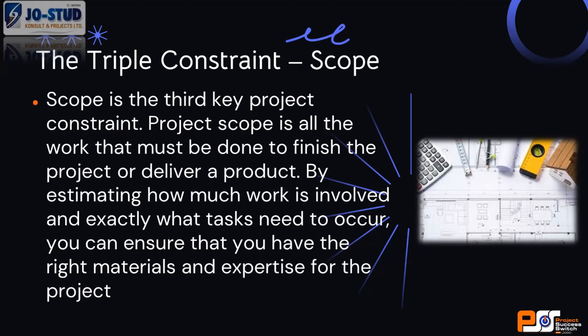Then an entire project can take up to 500 work packages. A very complex project can have thousands of work packages. Now, if you want to really know what your scope is, what is in the scope and what is not in the scope, where do you go? Your WBS. So if you remove anything from your WBS, you have made changes to your scope, and it's likely to have an impact on your cost and time, whether negative or positive.